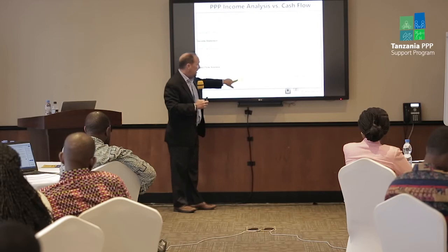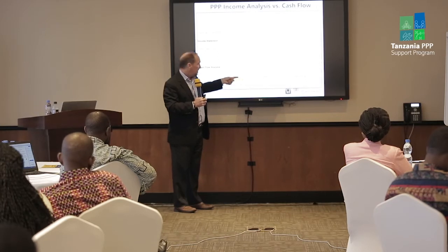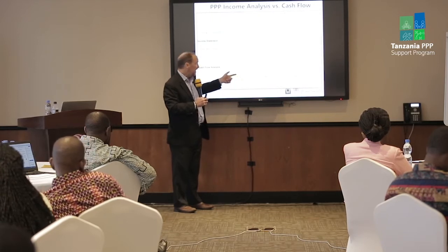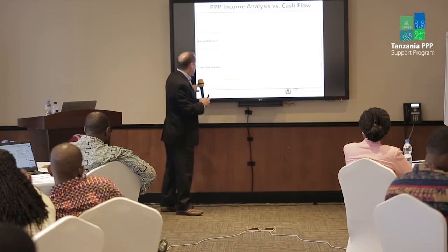So at a discount rate of 18.2%, if we discounted each of these expected future cash flows at 18.2%, brought them back to the present, they would equal positive $25 million. Make sense? We put in 25 million, we would expect the sum of the discounted cash flows back to be 25 million. So that gives us that.